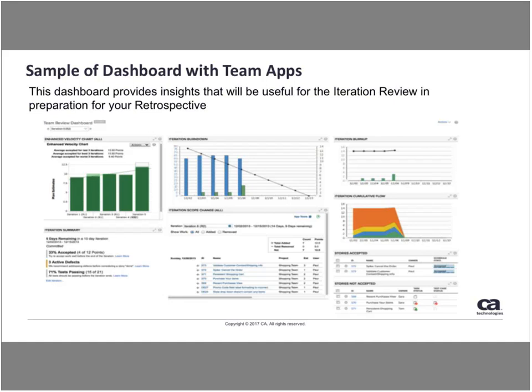This is just a quick visual of a team-level dashboard that one might set up. So this is useful for doing team iteration review. It's exposing for the team what the team's historical velocity has been, iteration over iteration. It presents their burn down chart for the current iteration so they can see how did we track against the iteration. There's also an app in the app catalog on scope change.